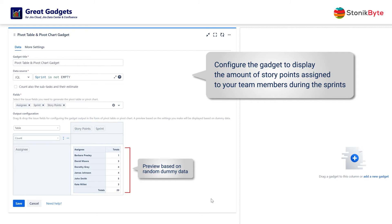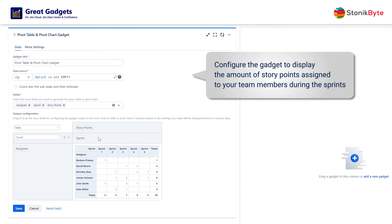After adding the assignee field to the rows area, break this information into sprints by adding the sprint field to the column area. As we can see, the table now shows the number of issues for each team member per sprint.